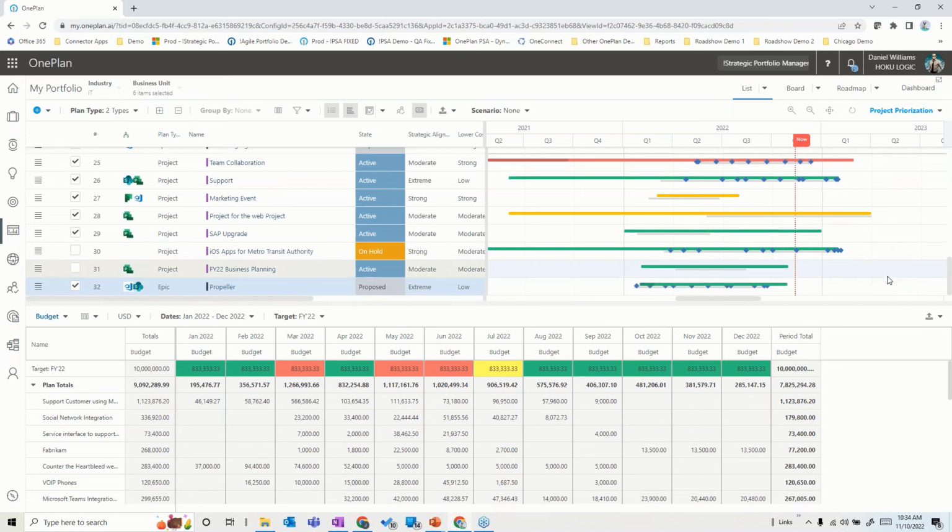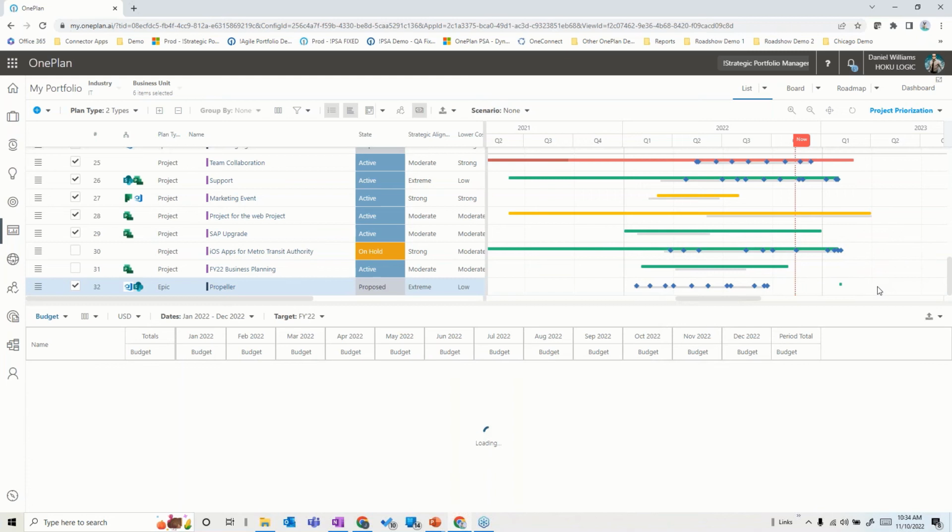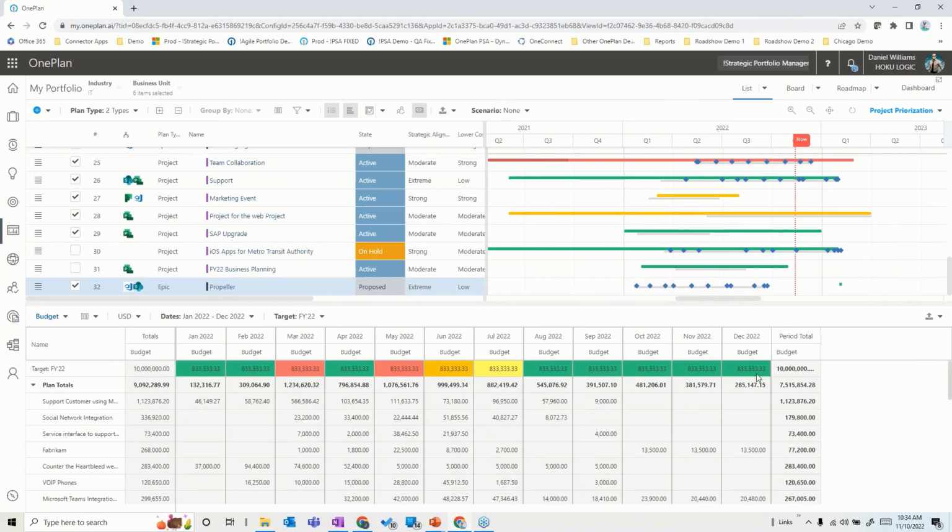By moving this out to the next fiscal year, it's actually going to remove that from the overall mix as far as the calculation, and then get it down to another level as we fit this within the budget constraints. So with the combination of selection and time phasing of the projects, we can look at these as scenarios or alternatives without impacting the source data, and save different scenarios which we can compare.